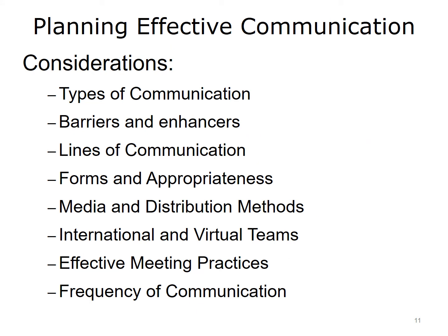In order to be effective in project communication, it is essential to consider the following items. What types of communications will you use? Are there barriers to communication and elements that will enhance communication? You can greatly improve communications by identifying these and addressing them. How many lines of communications exist between all project stakeholders? The larger your project team and stakeholder group is, the more complex communications become, and the greater number of lines exist. This makes it essential to distinguish formal project communications from informal or non-project communications.